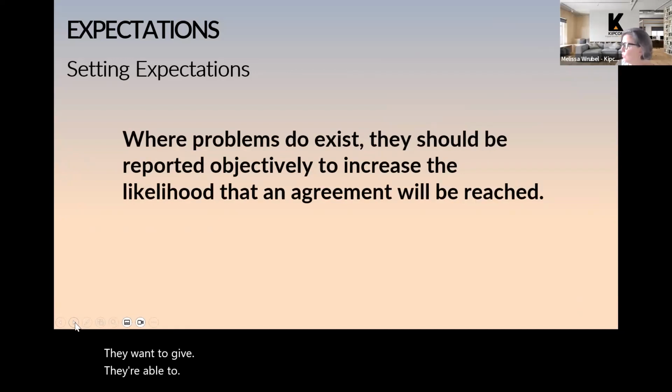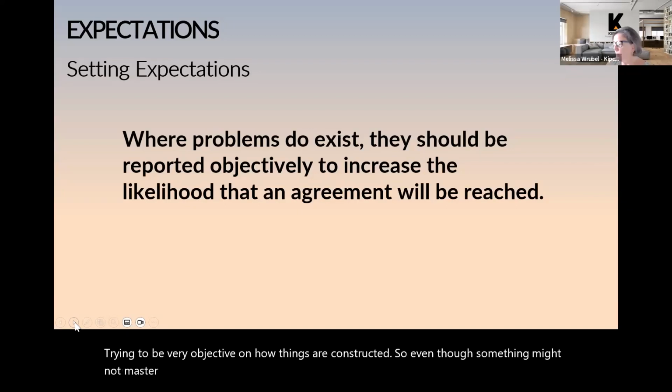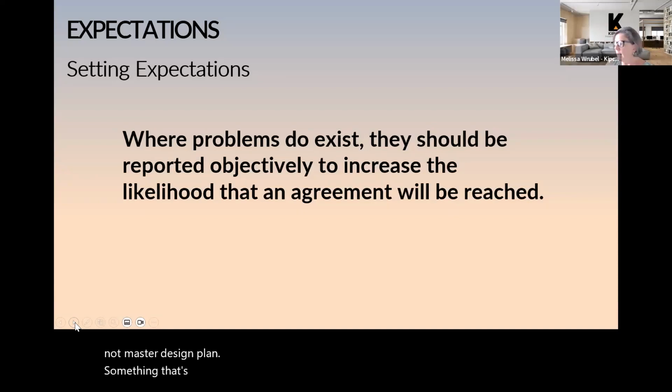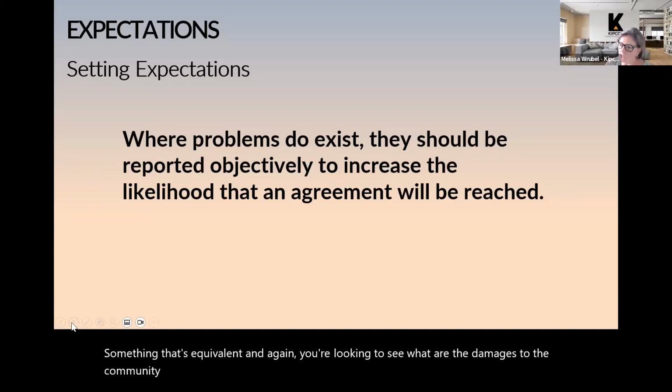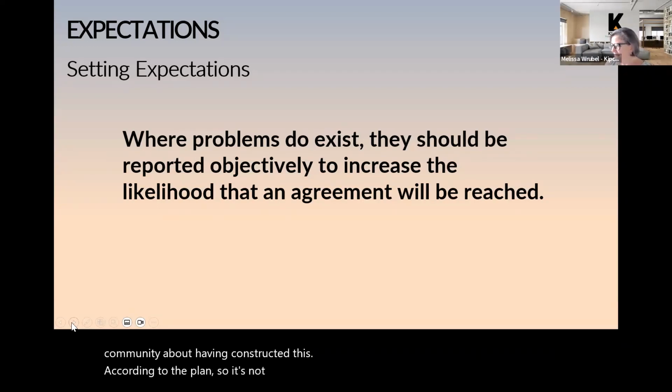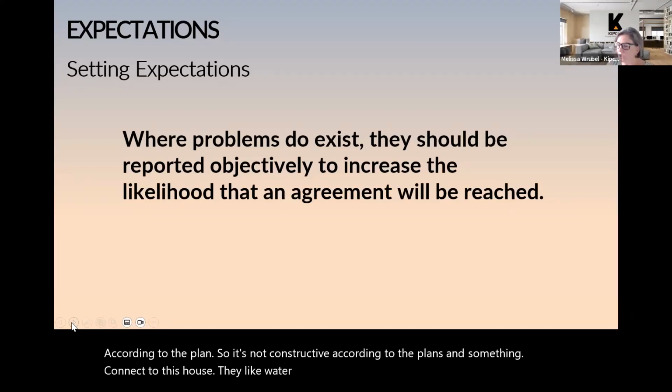Right. So this is also part of keeping a good relationship with the developer. So we try to be very objective on how things are constructed. Even though something might not match the design plans, we may look to see if it's something that's equivalent. And again, you're looking to see what the damages to the community are in not having constructed this according to the plan. So if it's not constructed according to the plans and something negative is happening, like water getting into the building or something to that effect,